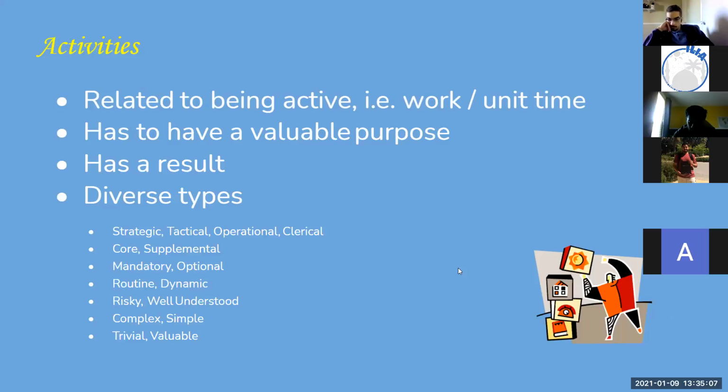It's important as you're managing a project to be cognizant which type this activity is, so you can give it the appropriate attention. If something is mandatory by regulation, by federal guidelines, by the law, you need to be aware of that in your project. If something is routine, you shouldn't worry too much about it. But if something changes, you need to know what are the circumstances that could cause it to change, because you don't want it to change on you without recognizing that. So that's a good checklist to keep handy as you have a project list of activities to ask yourself, where could I have some trouble with my project?